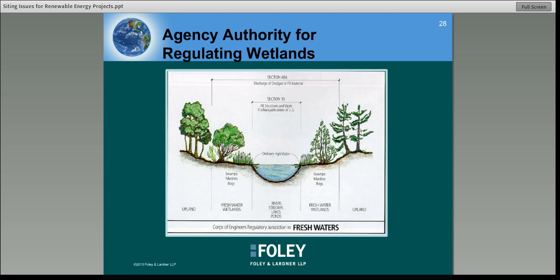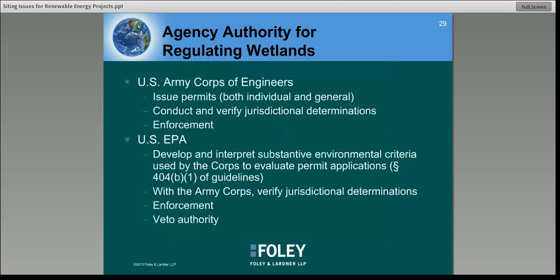So determination of wetlands is really a technical decision as much as anything, and it's a process to get Army Corps to sign off on whether or not to do a jurisdictional delineation so that you can verify where wetlands exist. Once the Army Corps issues a wetlands delineation, it's typically valid for 5 years. So that's an option to proceed, but where you need to move faster and getting a wetlands delineation is going to be too time consuming, there are a few ways to get a preliminary jurisdictional determination to avoid or at least postpone some complexities associated with formal delineations.